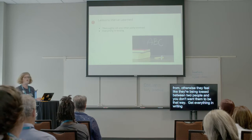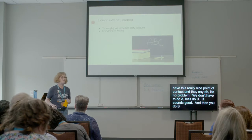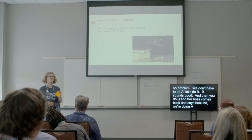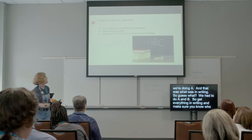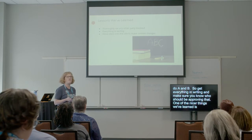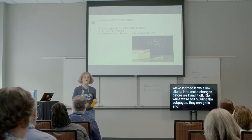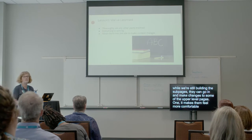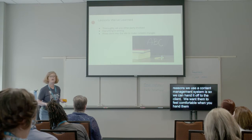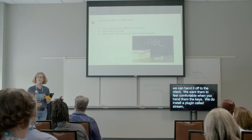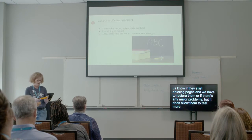Get everything in writing. Love when you have this really nice point of contact. And they say, oh, it's no problem. We don't have to do A. Let's do B. B sounds good. And then you do B, and her boss comes back and says, heck no, we're doing A. And that was what was in writing. So guess what? We had to do A and B. So get everything in writing and make sure you know who should be approving that. One of the nicer things we've learned is that we allow clients in to make some changes before we hand it off. So while we're still building the sub pages, they can go in and make changes to some of the upper level pages. One, it makes them feel more comfortable when you hand this site off. And one of the reasons we use a content management system is so that we can hand it off to the client. We want them to feel comfortable when you hand them the keys. We do install a plug-in called Stream. So which does let us know if they start deleting pages and we have to restore them or if they've made major problems. But it does allow them to feel more comfortable before we hand it off.